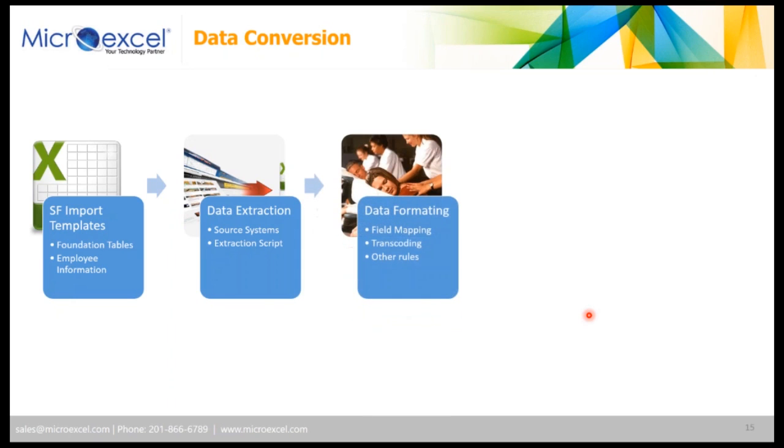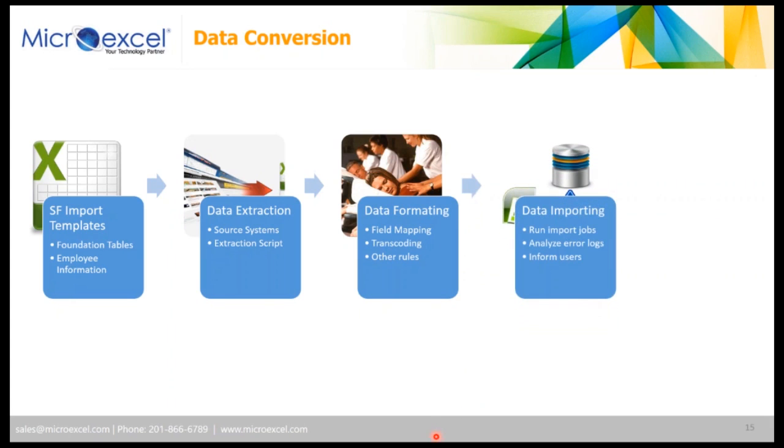Then there is of course the whole data formatting, or what we call data massaging, and that's really where you're going to have to map the fields, transcode them, and create some rules to fit into SuccessFactors. Again, it's something that either we do for you or you do directly in the SuccessFactors template, and that's what makes the difference between an implementation where you leave it to your HR people, or you want your service delivery or your partner to do it.